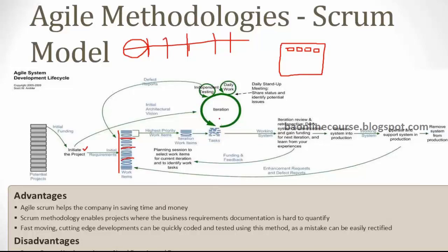And there's a concept called daily stand-up meetings, DSMs as we call them. So every day, there would be the project manager, who in this is called a Scrum Master. So he is the guy who coordinates everything. The Scrum Master calls for a daily stand-up meeting every day, and everybody would clearly understand what they need to do for that particular day. Okay, and what the dependencies are. So those two things are identified, and then they will start working on those activities.